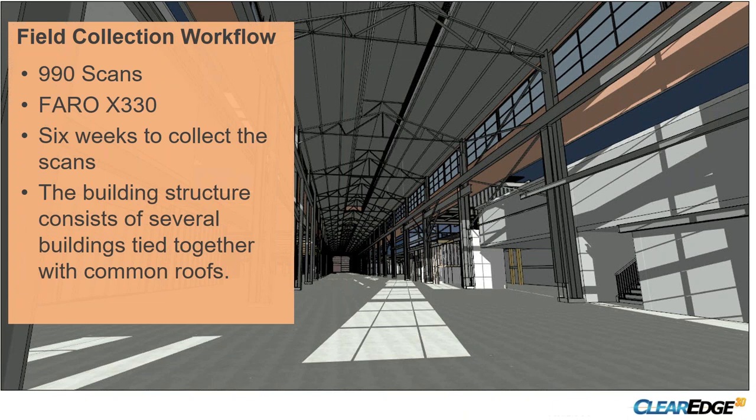And I can tell you on a few different older historical projects where walls were not straight or plumb or square, and we started modeling it that way, it was the right thing to do in that scenario, but the architect had a fit because now as they're drawing, everything is out of plane. But it is what it is, and it was going to affect the scope of the work they were trying to do. So it was a good thing, but it really starts to change up a workflow in a sense, working with people. There's lots of ways to go about it, but you want to be honest about the expectations up front and the fact that those things are not plumb and true.